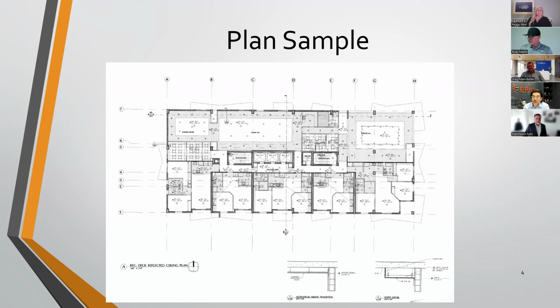Having as narrow of a variance is going to be recommended initially, just as taking the temperature of it. Having a narrow variance, to me, tooting my own horn, is going to be a good plan set. That is a good planning phase. That is good teamwork right there. You've established tight bidding parameters, meaning that your bid form, which goes correspondingly with the actual bid set of plans, is going to be itemized out.